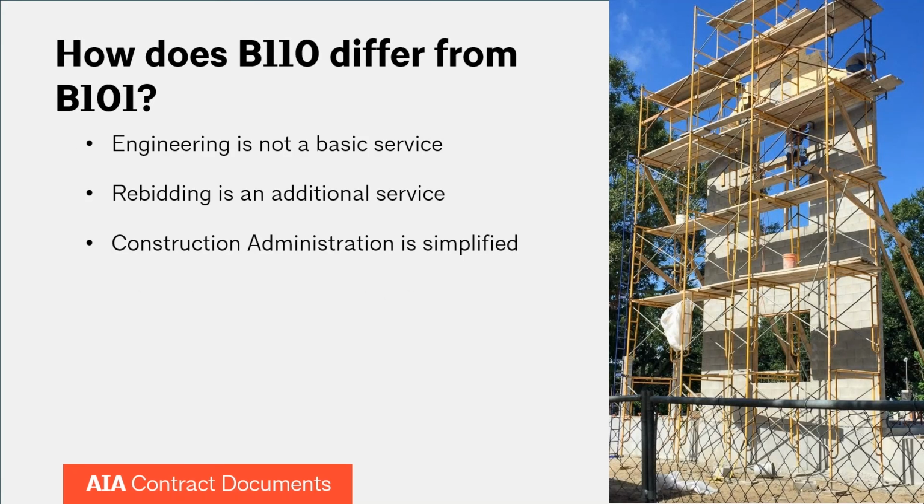The B110 does not include engineering as a basic service. This is an important distinction. Structural engineering, mechanical engineering, electrical engineering as a cost is not always quantifiable, especially in residential, and the program may change as the project evolves. Rebidding is an additional service.